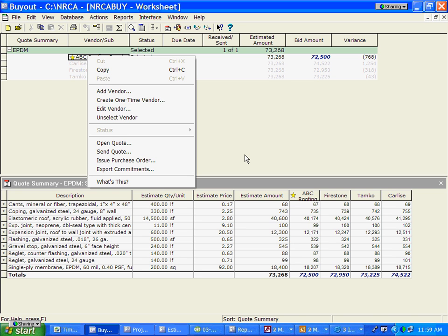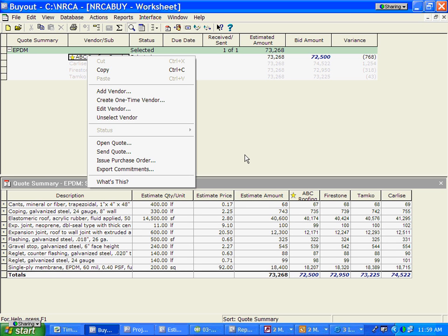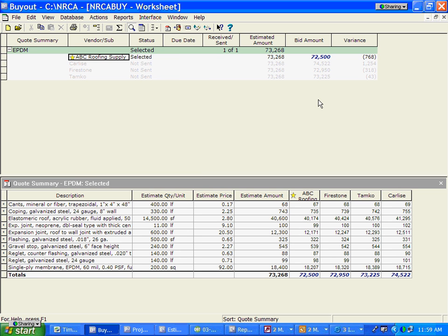I can literally do all of that, also apply all the appropriate job cost information, the job name, job number, the appropriate area or phase of the job, the cost code, the cost types of information, labor, material, equipment, subcontract, whatever it happens to be. I can generate all of that right here, right now, literally, simply by clicking on Issue a Purchase Order. It sets all that up for me. That's a huge savings in time, but a dramatic impact on my profitability. Why? Because I'm going to know not only what material I ordered for this job is, but what I agreed to pay, my committed cost is set up.